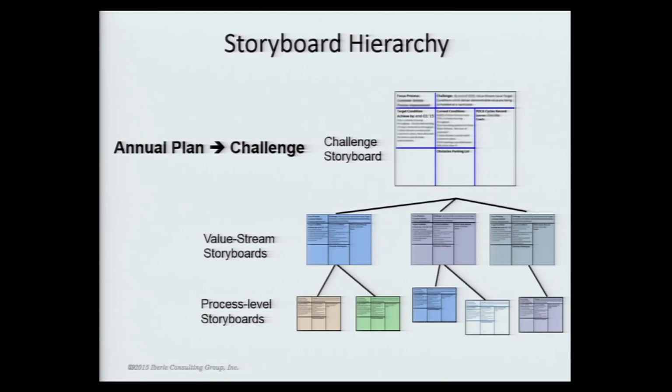So the improvement kata has deliberately set up these layers such that the people have the visibility and are responsible for checking on what's going on on a regular, frequent basis. So these coaching meetings are happening every couple of days. These coaching meetings might be more like once a week, but they're able to keep adjusting their plans because they're getting regular information. So they actually do a PDCA sheet at this level, and it's less concrete than the ones the process level people do.